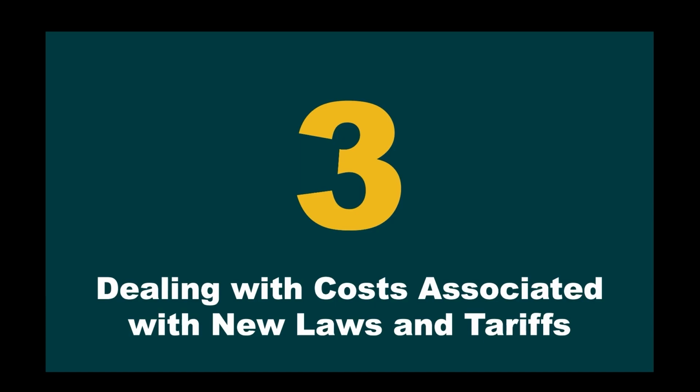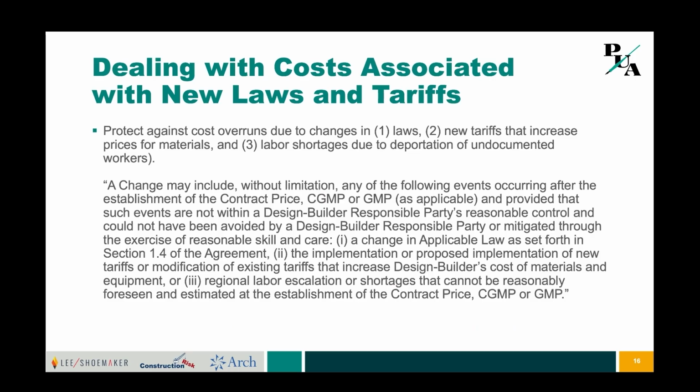Yeah, so just a few thoughts. The next slide, I have a clause here that was put into a contract on like a $1 billion project. We are involved in these guaranteed maximum price contracts around the country where a design builder will come in and propose a project for $1 to $2 or more billion, and they do it on a guaranteed maximum price and on a fixed schedule. There's liquidated damages if they don't get it done on schedule, and they can't get any more money if it goes over.